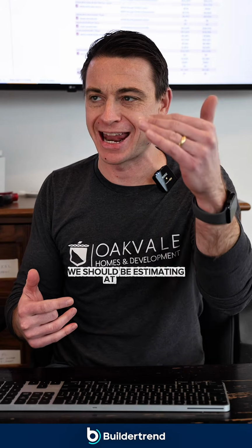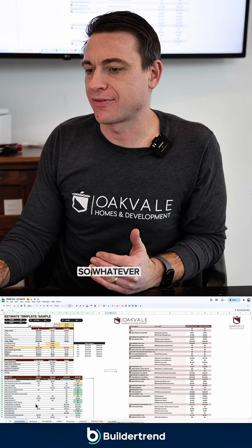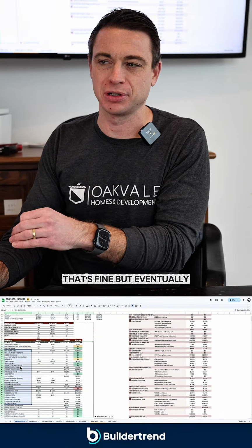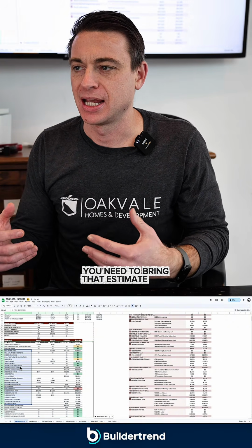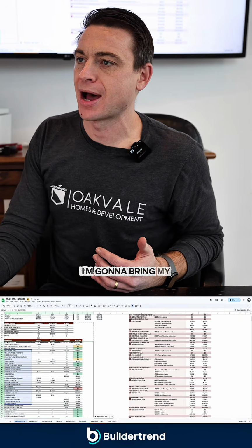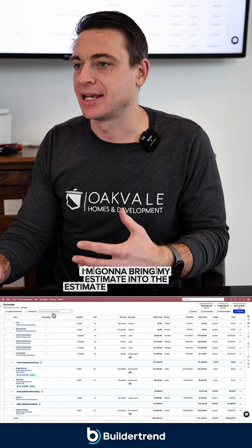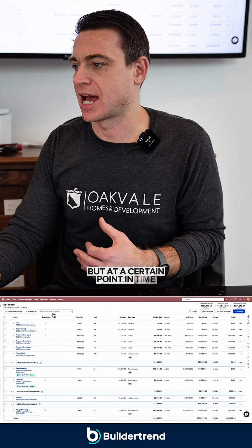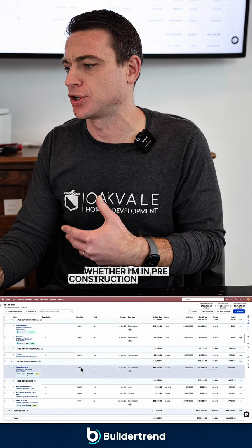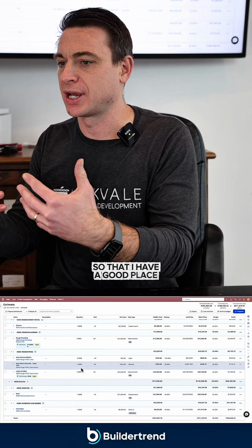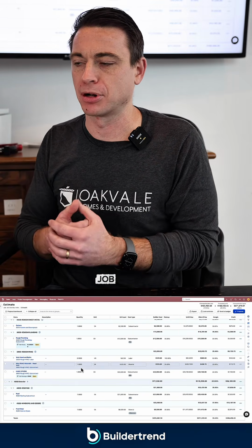We should be estimating at a cost code level. So whatever that is, if you're using a spreadsheet for whatever, that's fine. But eventually you need to bring that estimate into a piece of software that you can budget off of. For me, it's Buildertrend. I'm going to bring my estimate into the estimate of Buildertrend. Again, I don't necessarily build my estimate here, but at a certain point in time of the job, whether I'm in pre-construction or maybe further along, I'm going to bring my estimate in here so that I have a good place off of which to launch my job costing budget.